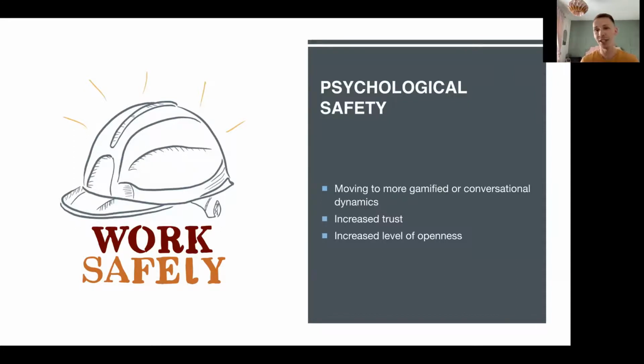And I think the easiest way to do that is just breaking the ice. There's a lot of research that suggests as soon as you've found your voice in a group setting, it's then easier to contribute. That's why I think there's a lot of talk in the agile community about icebreakers not being great. I always factor in, even if it's 5 minutes, just something for someone to find their voice at the outset, and they're much more likely to contribute in your session. If you don't take anything else away, that's a really, really useful thing.